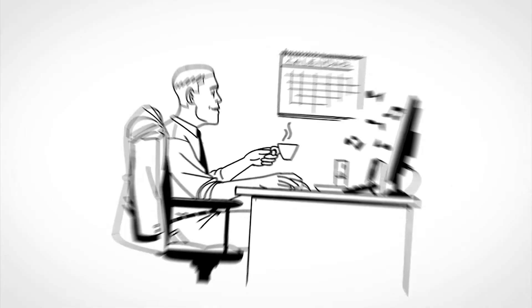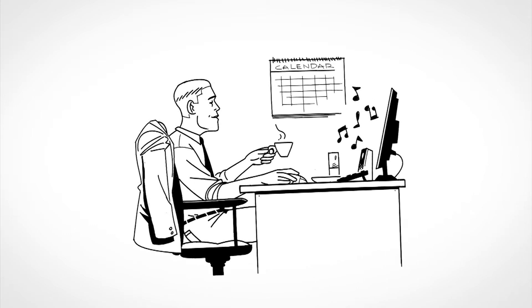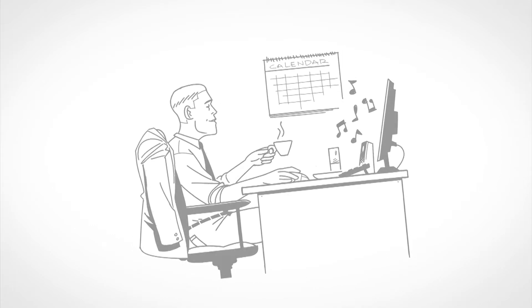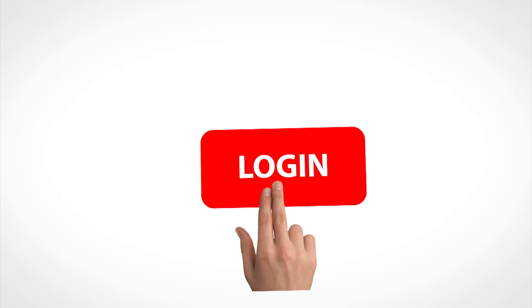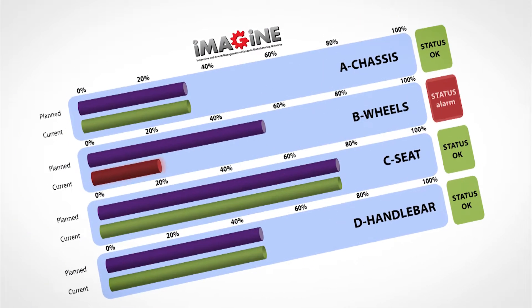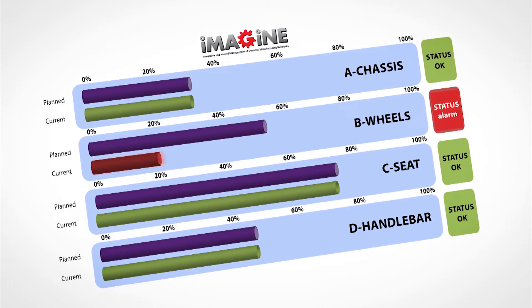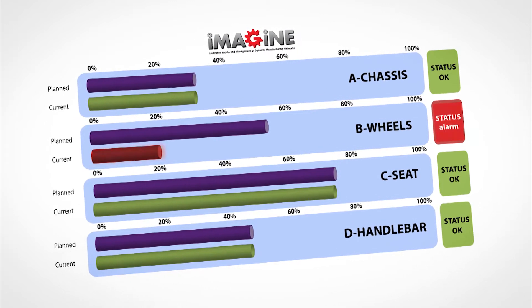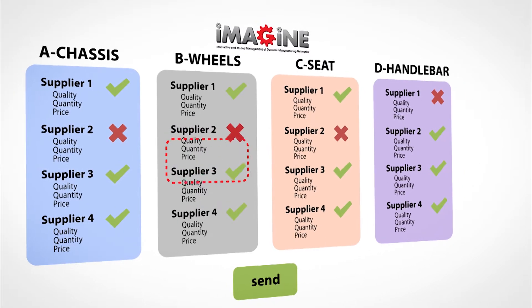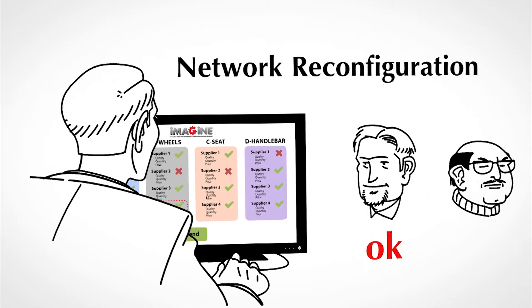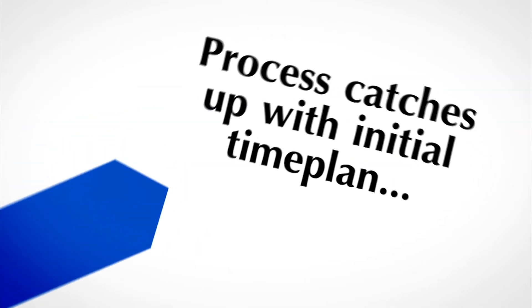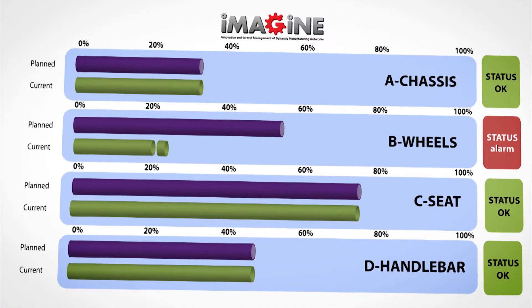Overwhelmed by the time saved thanks to Imagine, Mr. Goodworth is glad that the manufacturing process has started so soon. A few days later, Mr. Goodworth receives an alert concerning the production. He enters the Imagine platform, navigating to the network production monitoring screen displaying the progress indicators of the manufacturing process. The platform shows a warning indicator next to the supplier whose production is behind schedule. Switching back to the supplier selection configurator, he finds another supplier capable of carrying out the remaining order. Imagine sends the new manufacturing orders to the new supplier, notifying the old one to terminate his process. At the end of the day, the manufacturing process that was behind schedule catches up with the initial time plan.